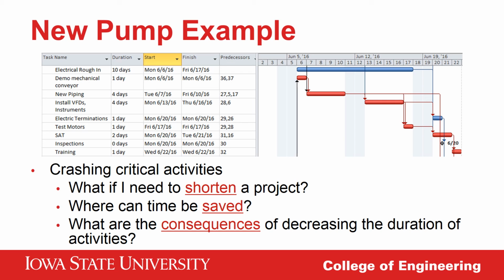Tank 600 is a large batch tank that will be out of service from demolition up until SAT, or site acceptance testing. No production can take place in this vessel at this time. The tank produces about 50,000 pounds of product per day, and the Gantt chart shows out of service for a minimum of 10 days. So that's 500,000 pounds of missed production. In round numbers, the profit of this material is about 20 cents per pound, so $100,000 lost.